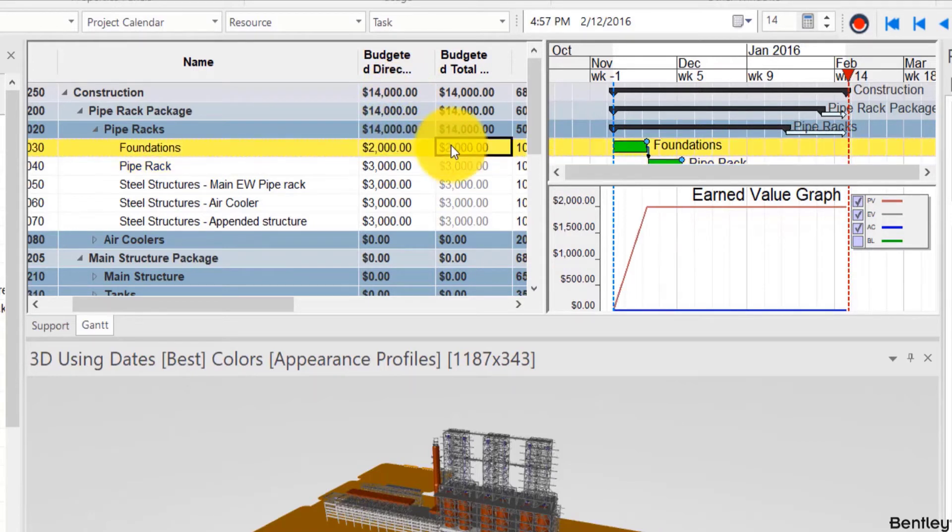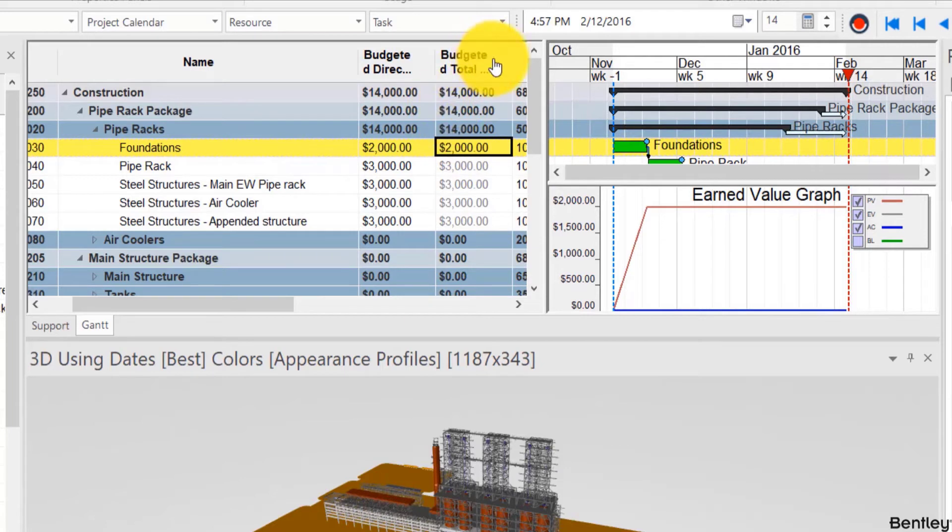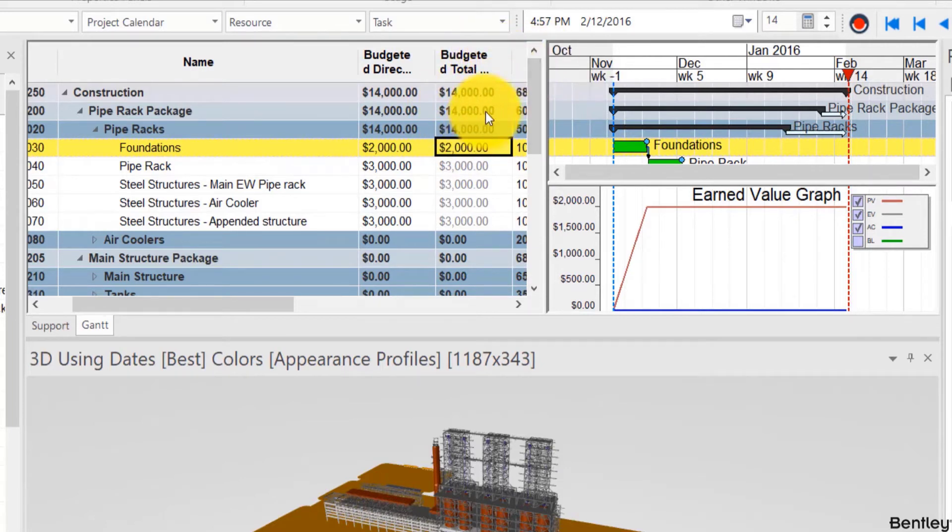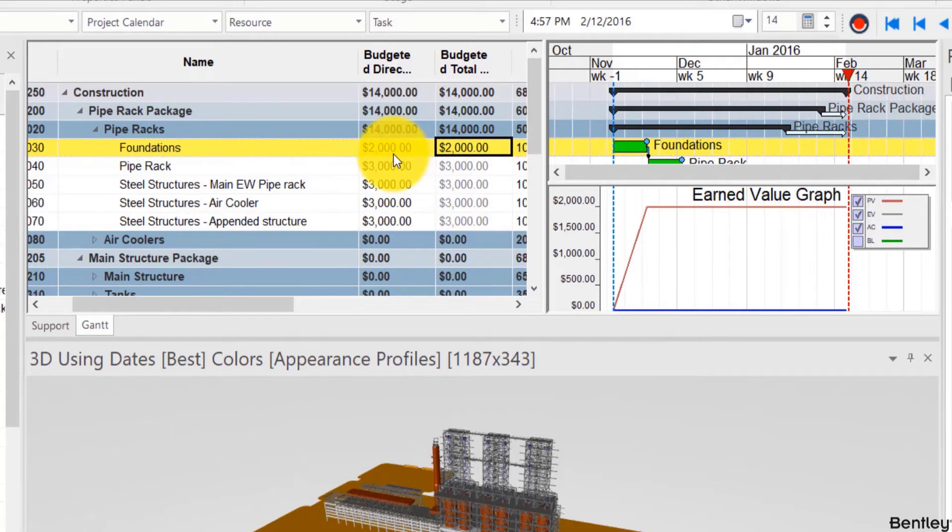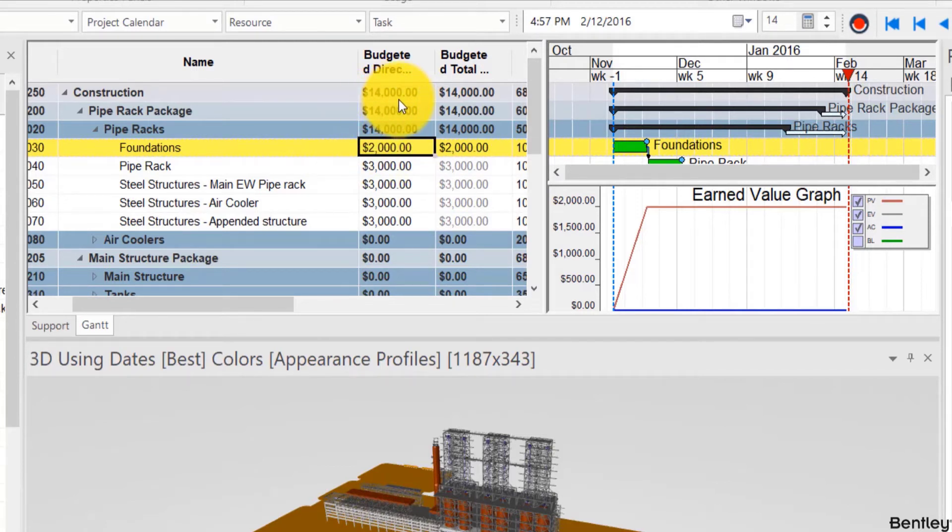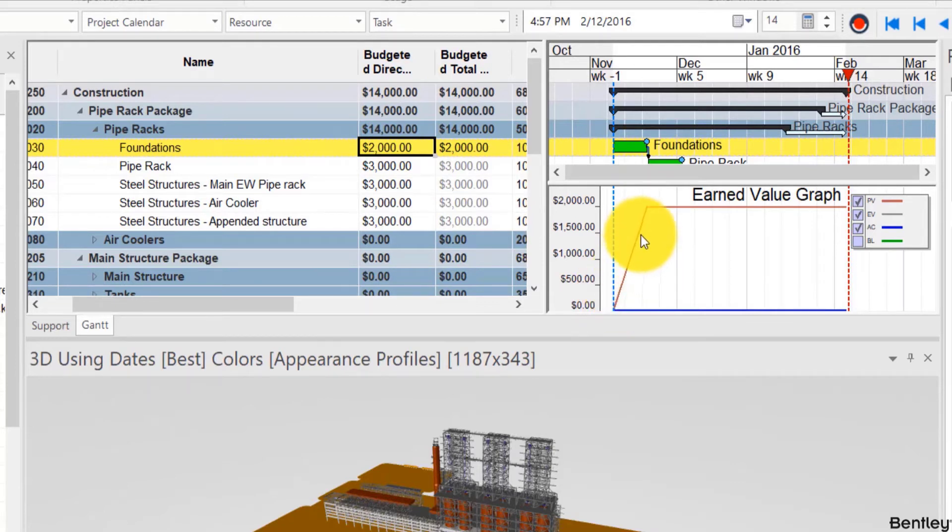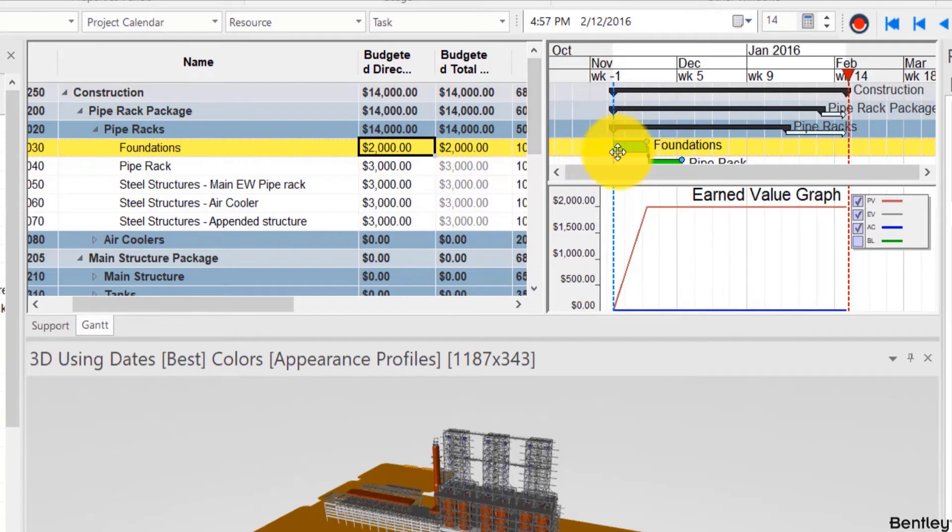Now I can't type in anything here because we'll explain that later but this will show the total costs including indirect costs. Now by typing this here automatically we see the costs adding at the level of the parent but also we see at the level of the task for the earned value graph the costs rising from 0 to 2000 for the duration of that task.